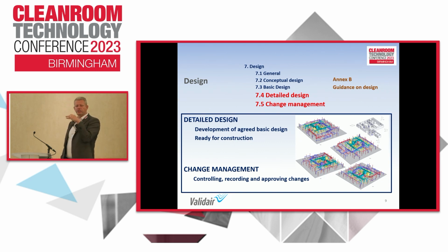At each of these stages, you should do a review. I won't use the word qualification. ISO standards aren't just specific for our regulatory environments, they're across all industries. But you should do a review at each stage of design. So you look back and go, okay, we've developed this design. Have we moved away from those requirements we spent all that time getting right to say what we wanted? So you go back at all those stages and go, are we still in line with that? If we're not, there may be a good reason for it, and you just document what that reason is, that we know we've moved away from it because we've got a better solution somewhere else. And there's a section within the design which is on change management. It talks about controlling and approving changes, so the change control that we would see in our pharma world.